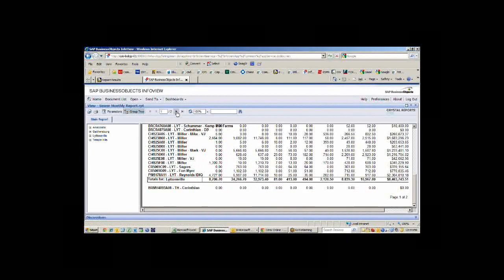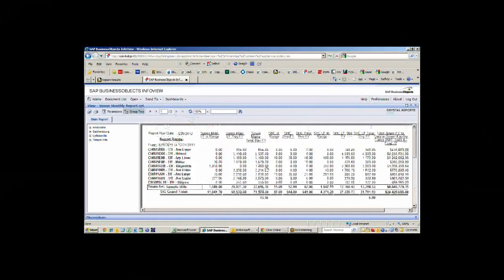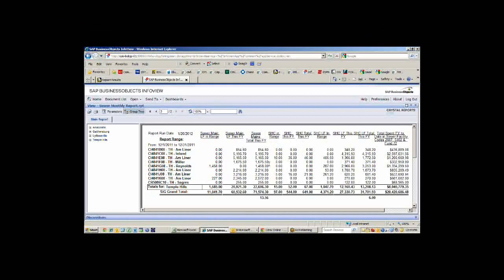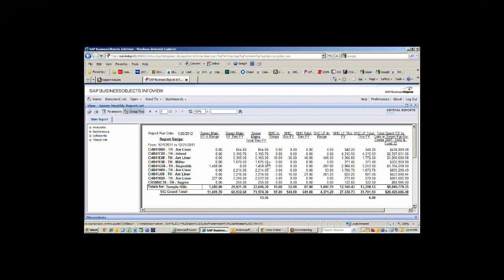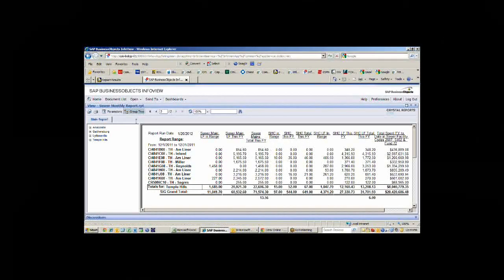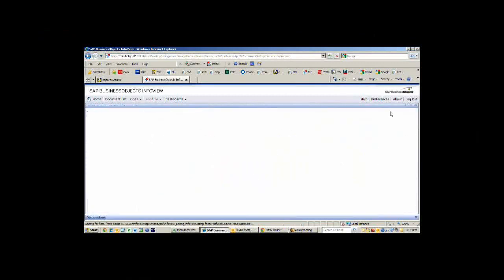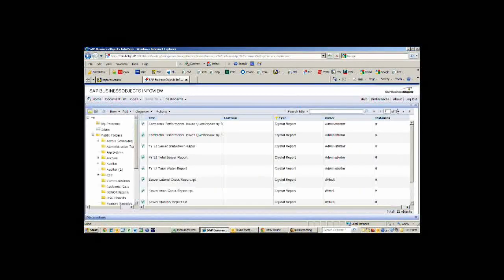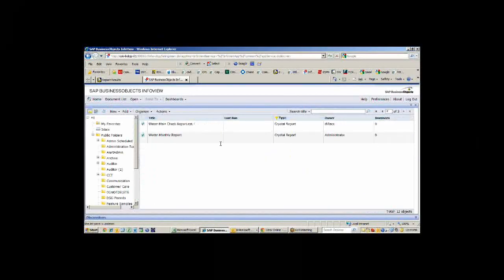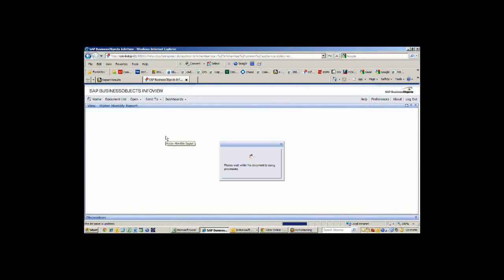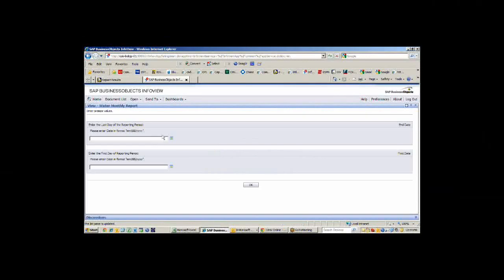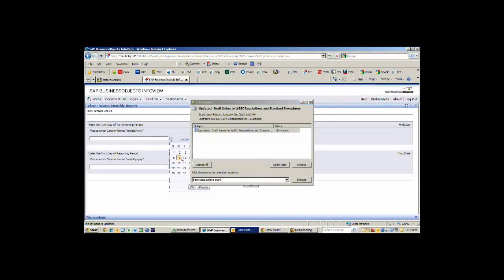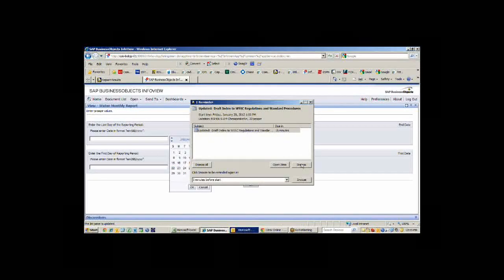This is the monthly report that we produce on the 29th or 30th of the month, depending on what it is. This is what gets sent to the chief engineer. We have the same report for water. We have a water monthly report we can run that does the same thing.